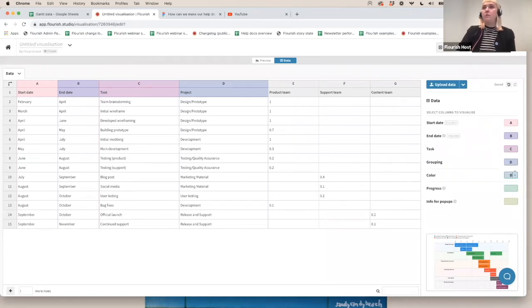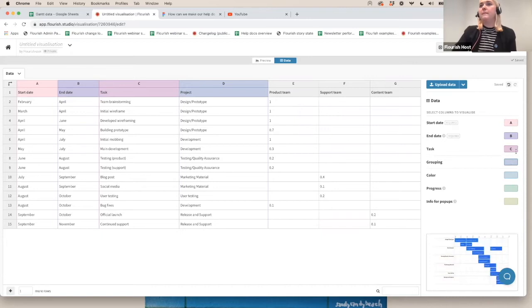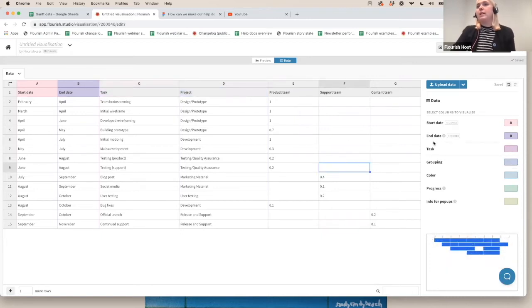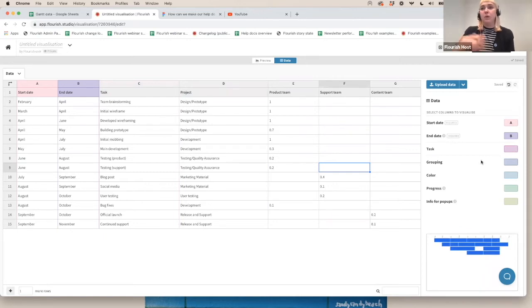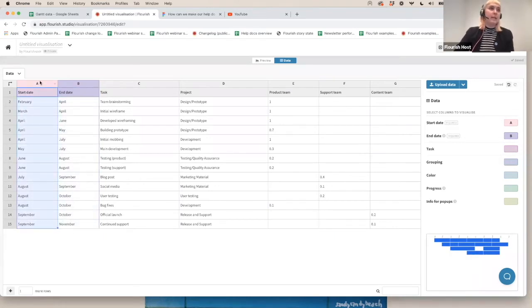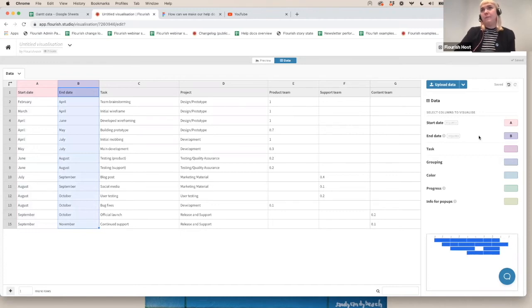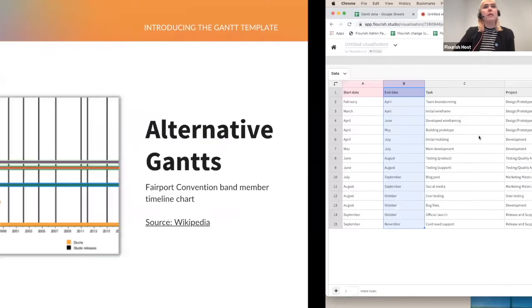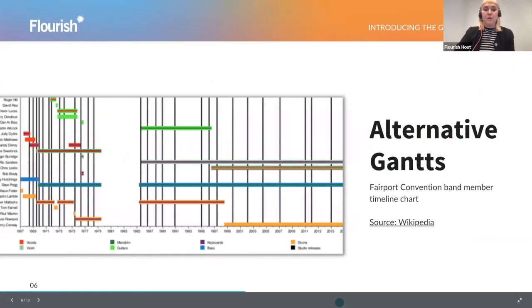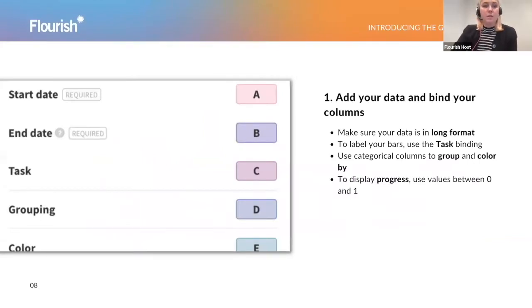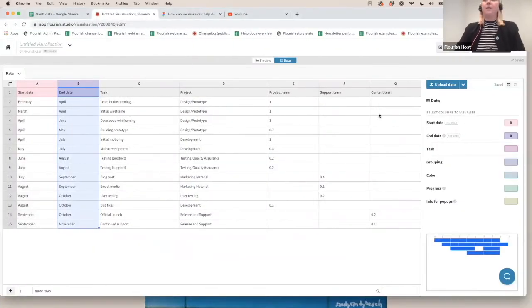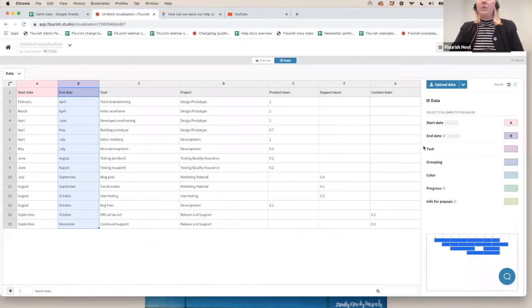I'm just going to remove all of the columns that I don't need because actually only some of them are required for our Gantt template. All you need is the start date and the end date. So you could create a Gantt with just the start and the end date, which has to be something that can be interpreted as a date. So all I need in this case are my A and B columns. But of course, if I want to add more information and context to my Gantt, then I can add additional column bindings. And I'm going to go through those now.